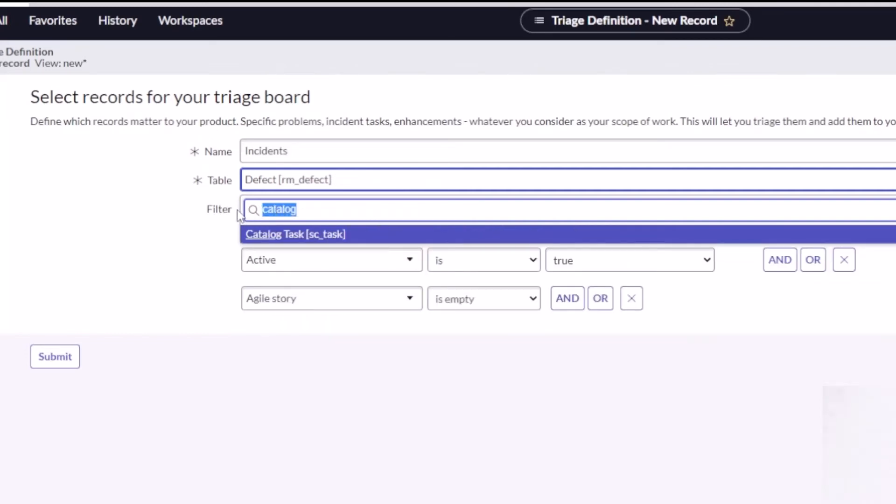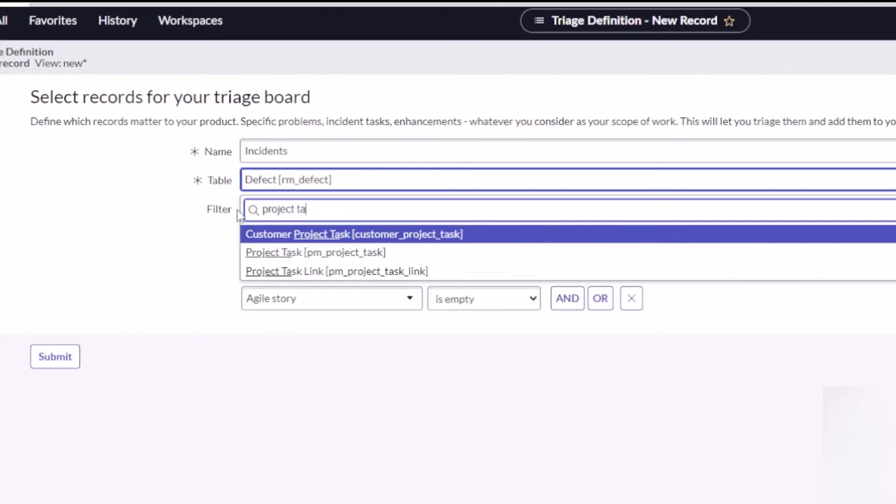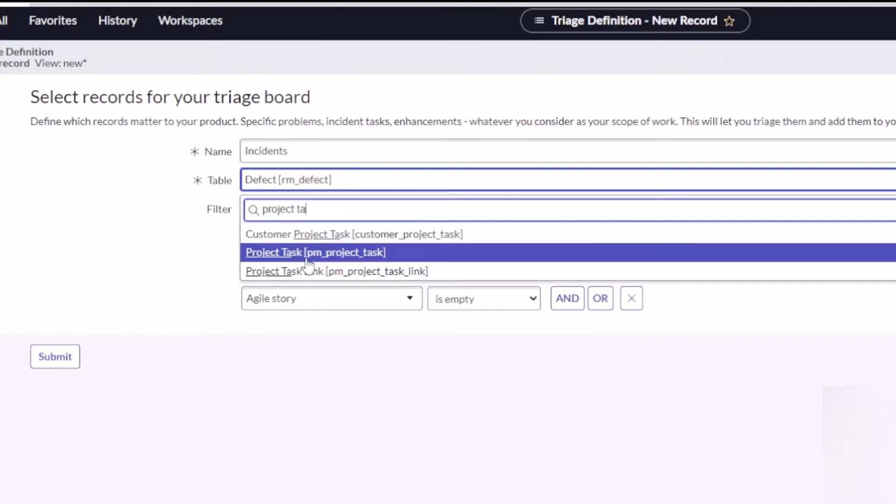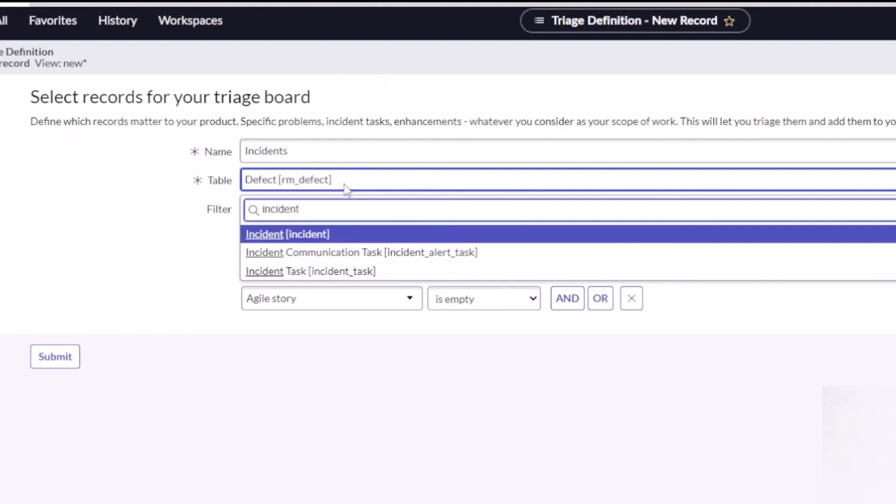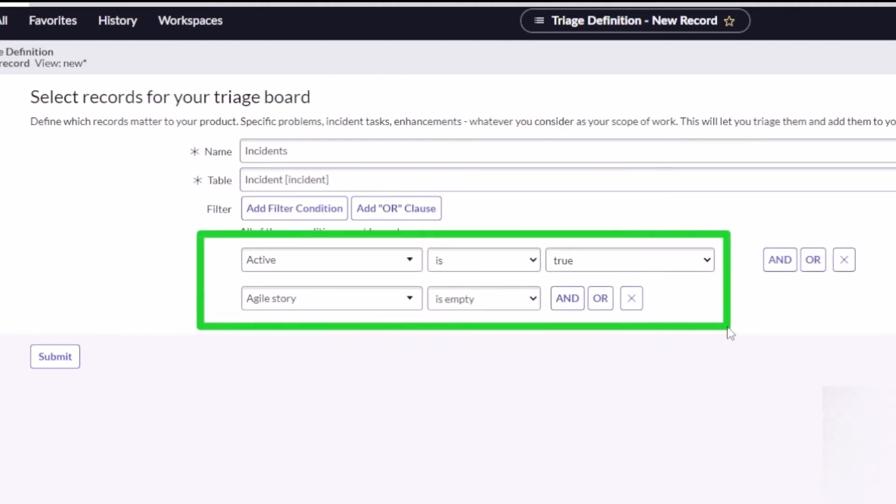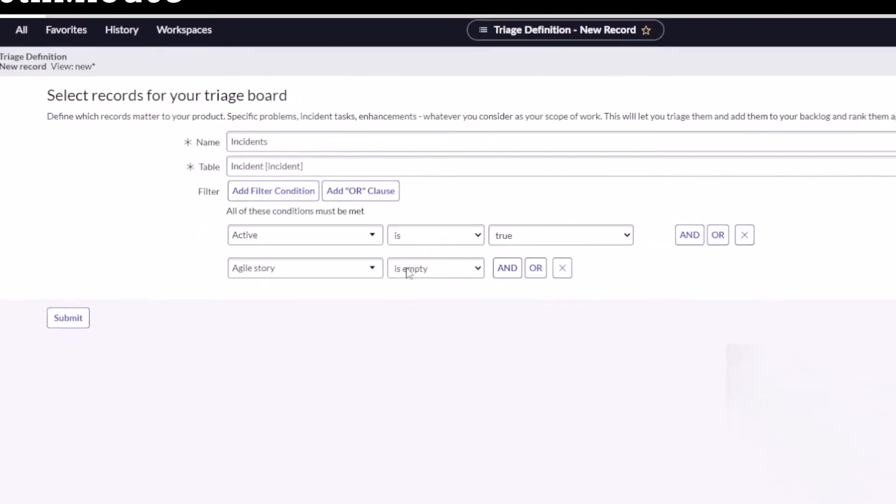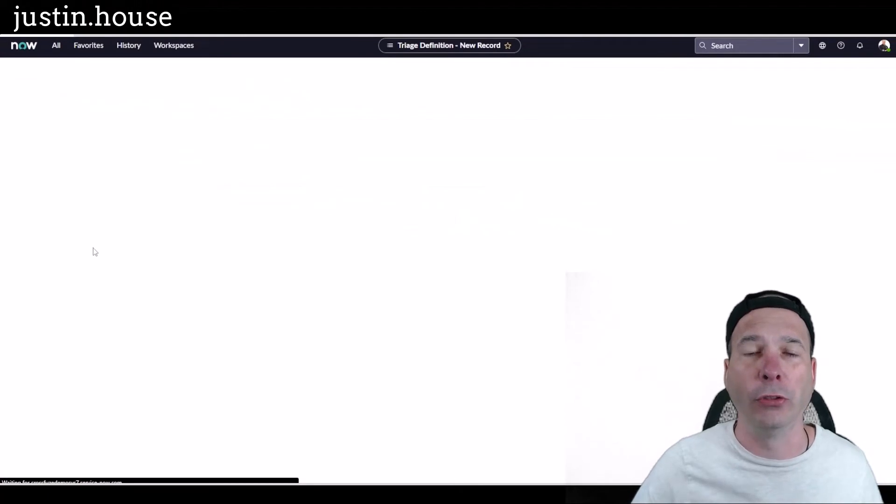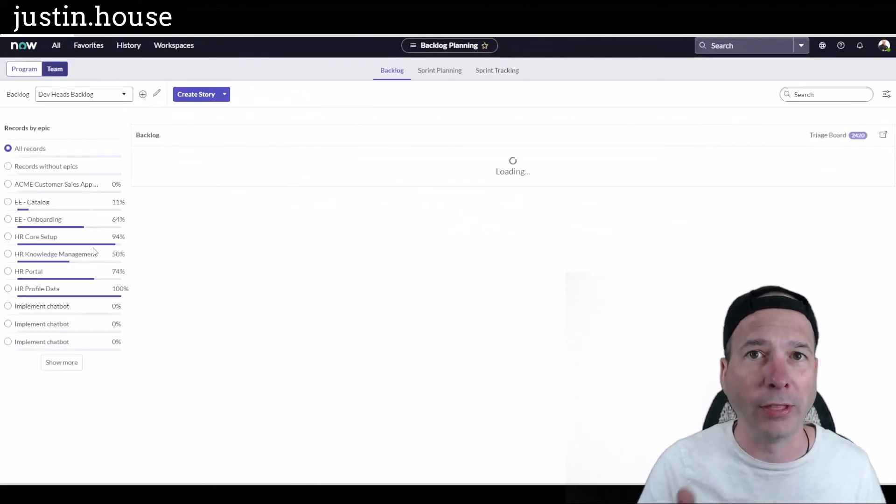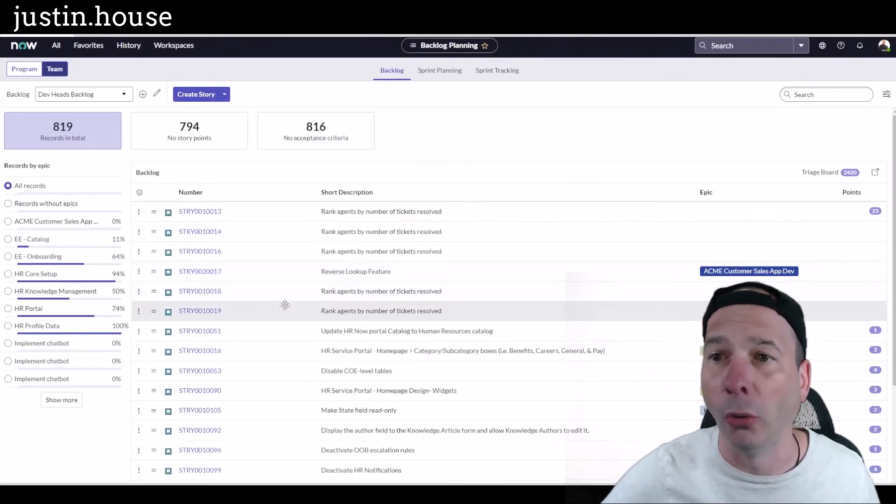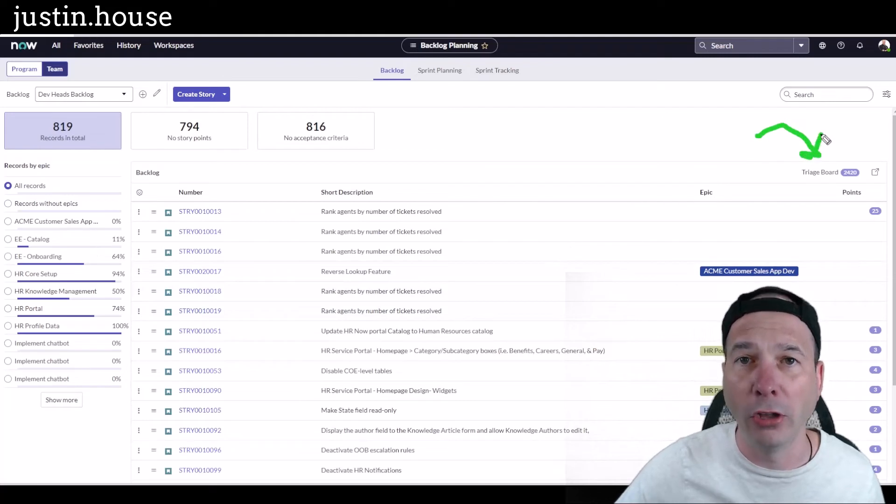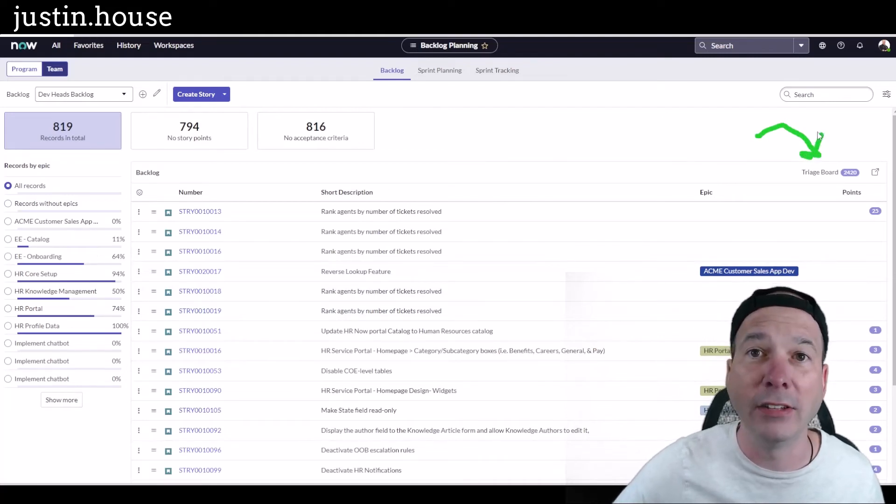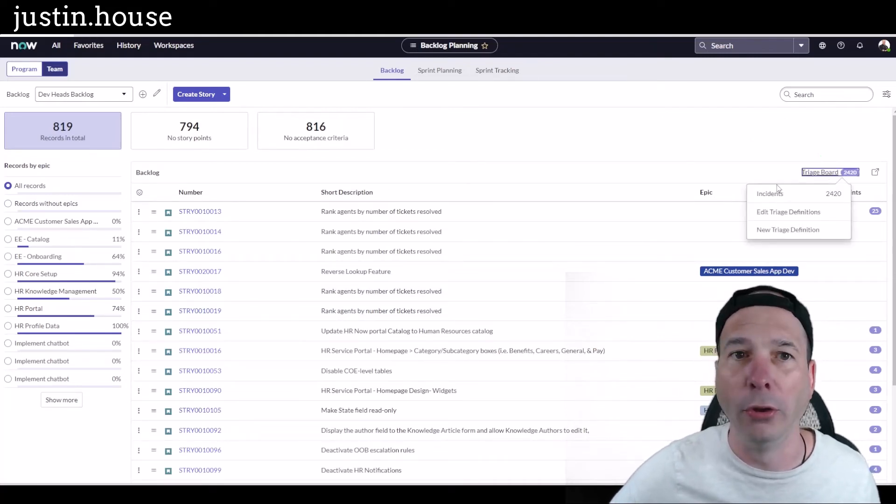Here's one that might be familiar: what about a project task? You may have a project manager who's assigning you work and you want to put that into a sprint so you can manage it. You can do that. You can make a project task. Let's actually stick with incident in my example. You get the idea—we can pull any of these. I'm gonna leave the criteria that the incident is still active and the agile story associated with the incident is still blank, meaning it hasn't been associated with a story yet. I now have a triage board with 2,420 incidents on it.